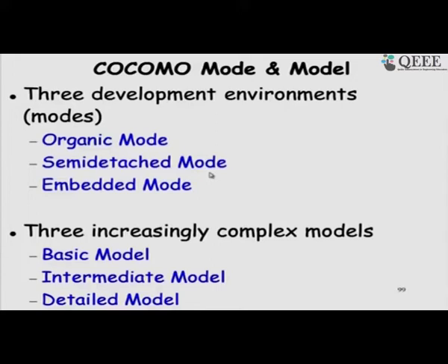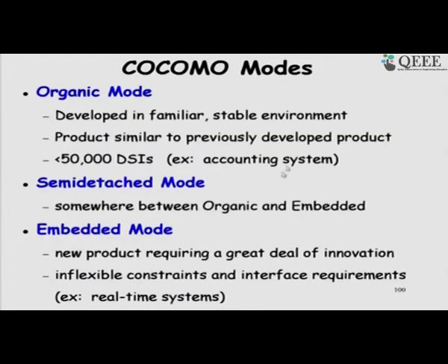To classify the software being developed, some software are very complex, some are moderate, and some are very simple. So, he proposed to classify software into 3 types: organic, which are easily developed; semi detached, medium; and embedded, which are complex. He said that even a simple software developed by a very inexperienced person, without using any process and tools, may become very complex for them, and we have to consider that as embedded software.